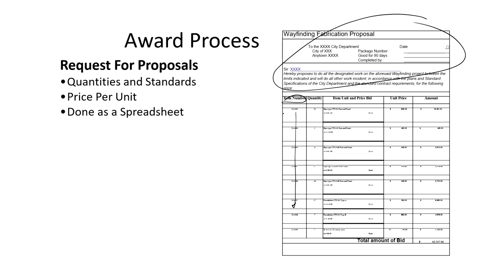That means, suppose I am using a directional sign, I can use the code DR0001 and then my signage number. Quantity, here it's been mentioned 24, item, unit and price bid. So, a small instruction or specification of the product and then the unit price. Here we will be mentioning the unit price and multiplying this by the quantity, we get the overall amount.